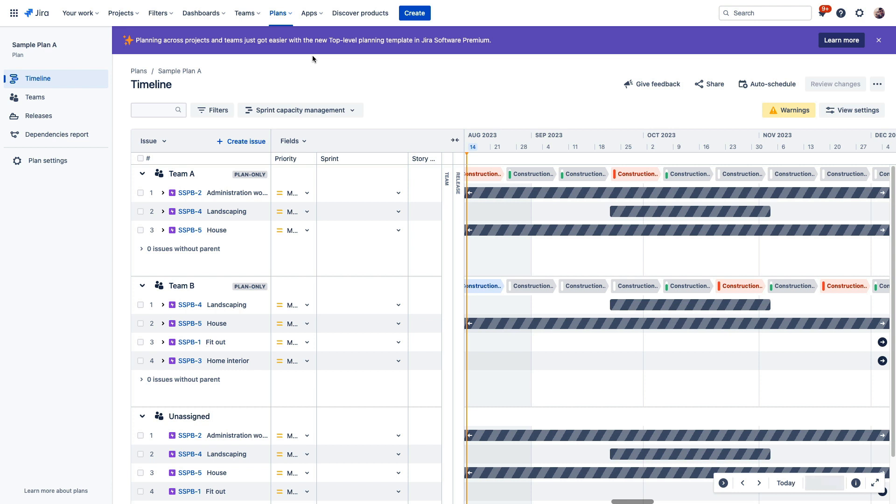Now, plans are a feature of the Premium version of Jira Software, and plans are effectively a roadmap or a timeline which compiles timelines from multiple projects together so that you can get a higher-level view of how your work is moving across the entire organization rather than just at the project level.